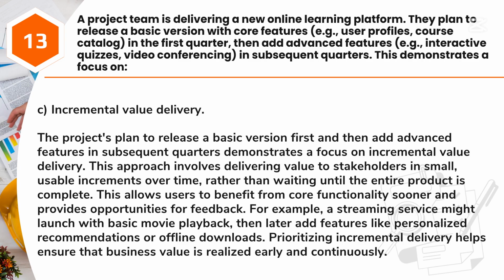Answer: C. Incremental value delivery. The project's plan to release a basic version first and then add advanced features in subsequent quarters demonstrates a focus on incremental value delivery. This approach involves delivering value to stakeholders in small, usable increments over time, rather than waiting until the entire product is complete.